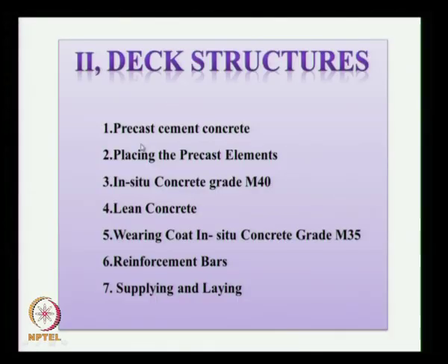Then we will move on to the next item, deck structures. We have a precast concrete. There are two items here, one is to make the concrete, another is to place. So this placing is for lifting it from the yard and placing it at the exact location. It is a combination of precast and in situ concrete. In situ concrete we have to put, then we put some lean concrete on top of the deck structure. Then we may put some wearing coat, then reinforcement bars, then supplying and laying. These are the items which we have to see.